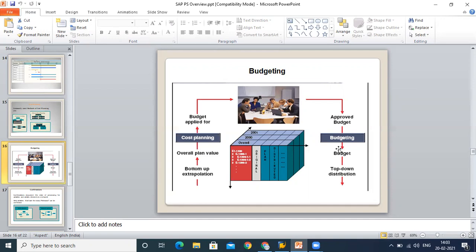Budgeting is not simply to monitor the cost, but on the basis of this budget we can also control the cost. If we have fixed a budget for a particular WBS, then we cannot procure more than that assigned budget. This is a kind of controlling. Budgeting is not only monitoring, but it is also an important aspect in your project system.